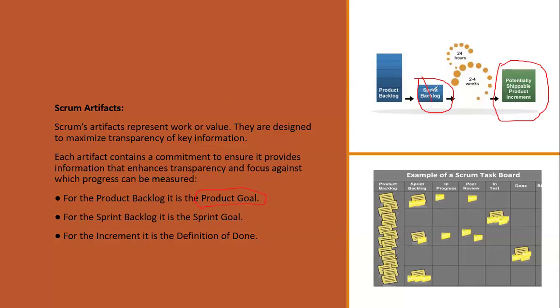The commitment means what the team is going to focus on, which must be fulfilled, and that is what they call the sprint goal. So you cannot plan a sprint without writing a sprint goal in it, right? You need to write your sprint goal because that is the commitment for that backlog, for what the development team is going to focus on.